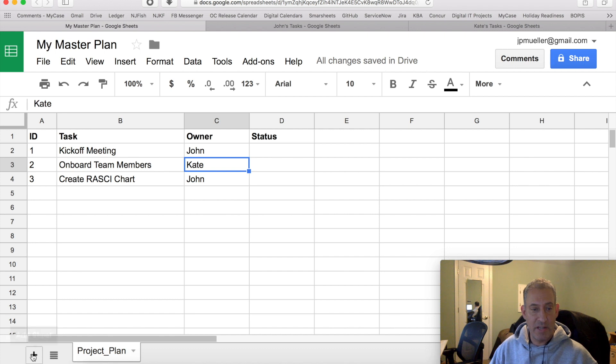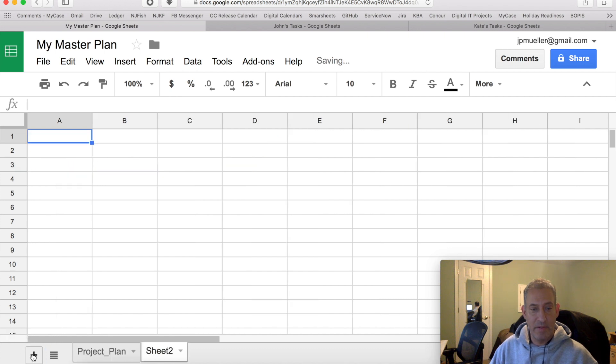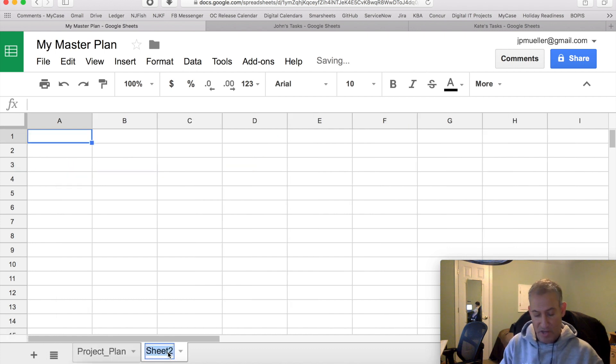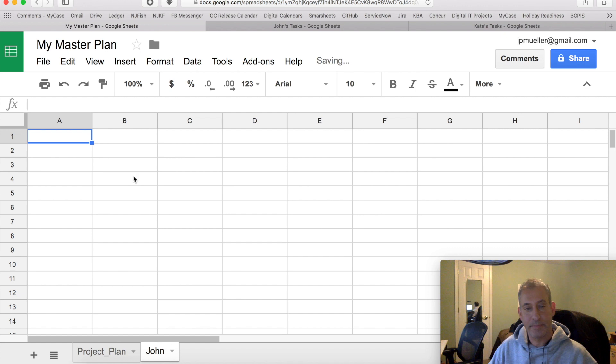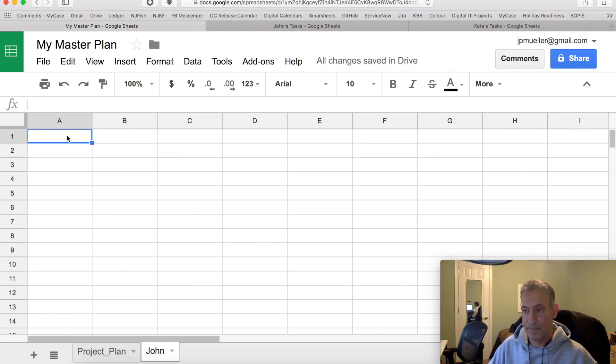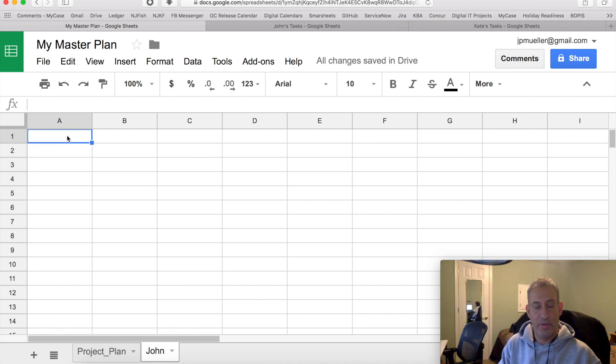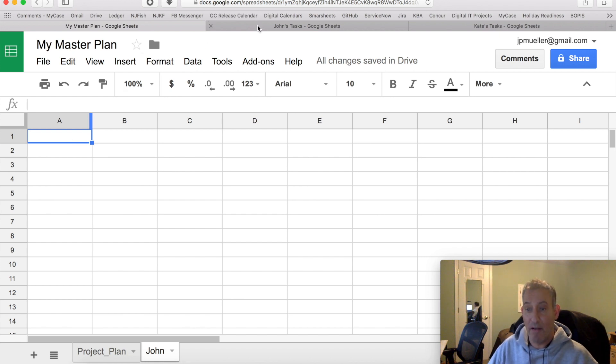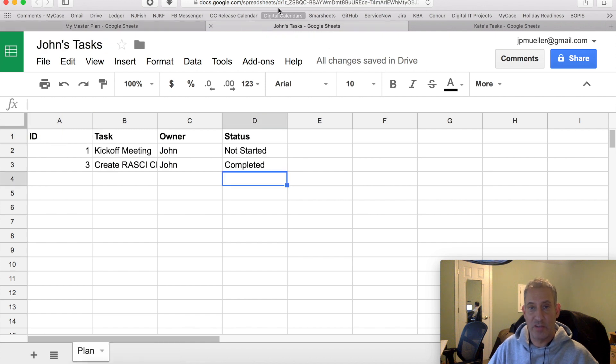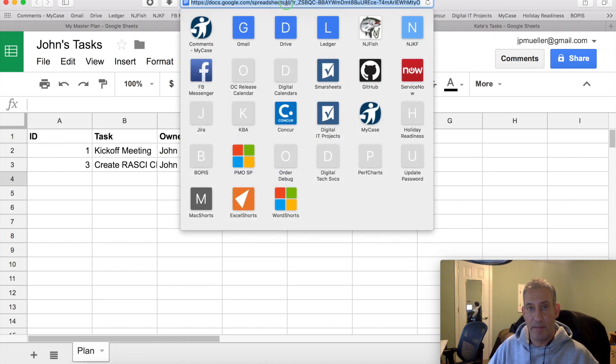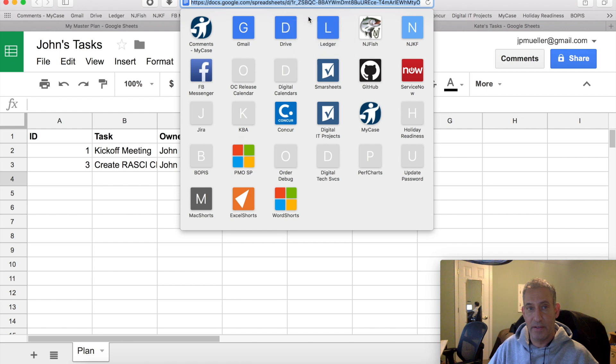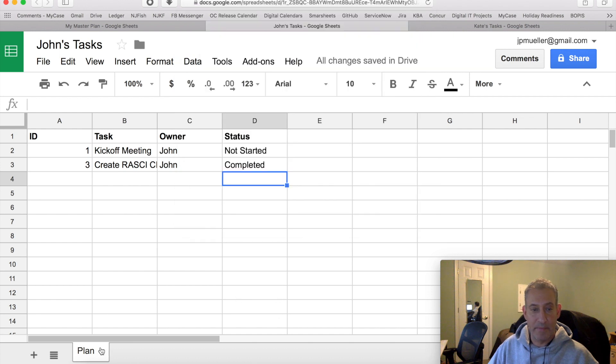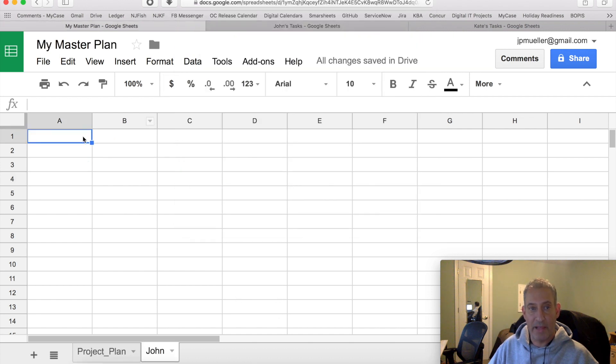The first step is we want to basically import their whole tab to our whole tab. So in here, I'm going to add a sheet. I'm going to call it John. And on this sheet, I'm going to tell it to import a range. But in order to import the range, I need to know the URL from the other sheet. So I simply go over here. I'm going to highlight the URL. I'm going to copy it.